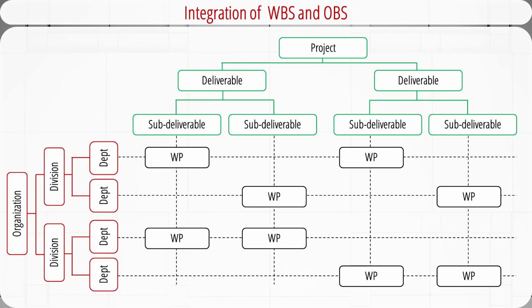For example, the organization is divided into 4 different departments: design, production, testing, and outsourcing. The cameras involve 2 separate work packages. Each work package is responsible by an individual employee from a different department. The other part of the diagram can be read in a similar way.